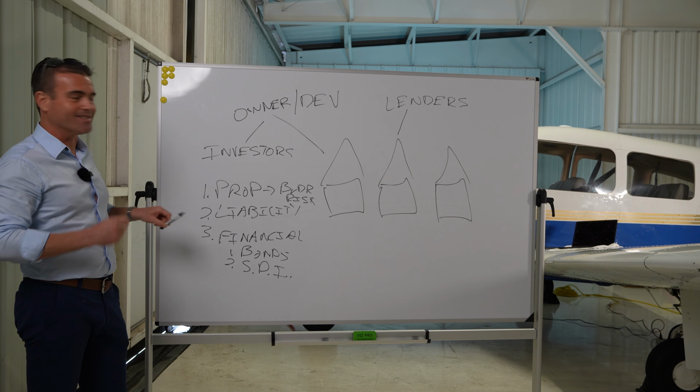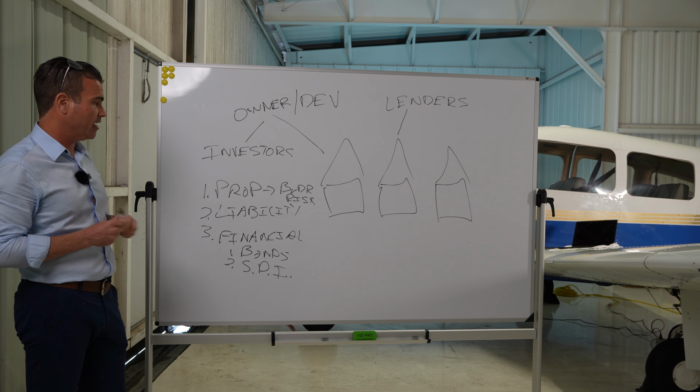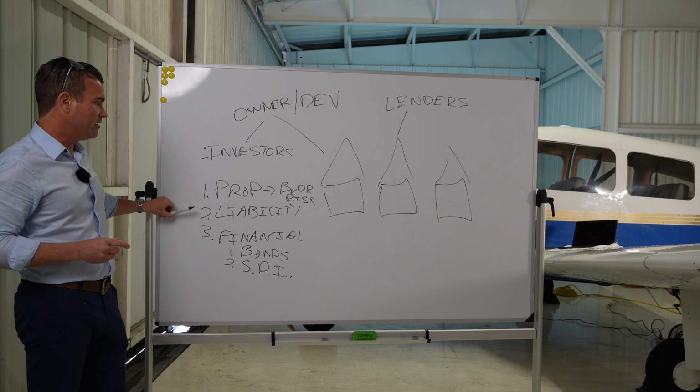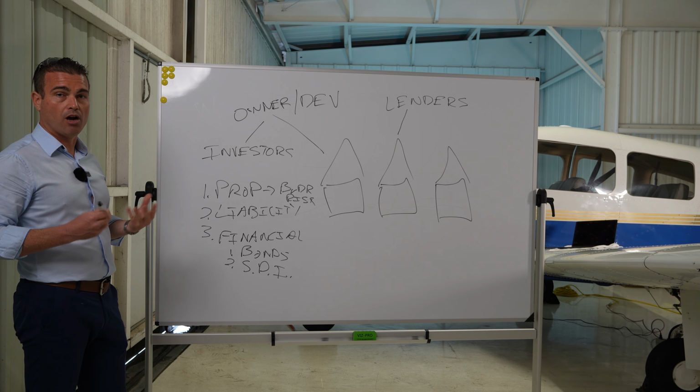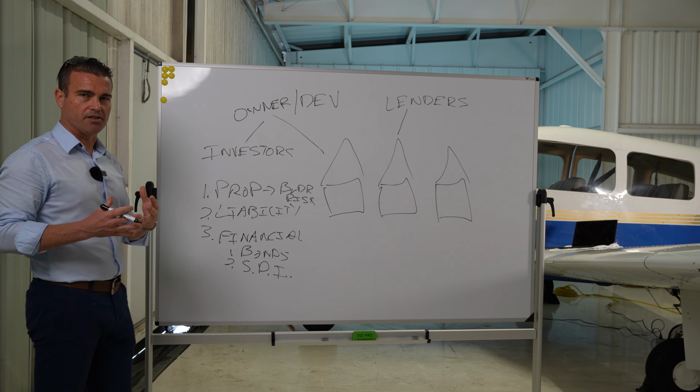We break those limits down into the specific buckets where they need to be allocated. So that's property under the builder's risk. Next is liability. One of the things that we always recommend, and typically based on the size of projects we're